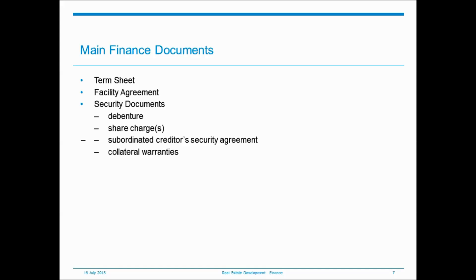The security package will generate several documents. The borrower SPV will sign a debenture, which broadly gives the bank various types of security over various assets owned by the SPV — including most obviously the site itself, the SPV's rights under key documents in the deal, insurances, etc. The JV partners will typically both sign a share charge giving the bank security over shares in the SPV, and will also often give the bank security over the benefit of their subordinated loans advanced into the SPV — what we've called the subordinated creditors security agreement. Collateral warranties are a key set of documents from the bank's perspective, designed amongst other things to give the bank the ability to step in and procure the build-out of the development if things go wrong during construction.